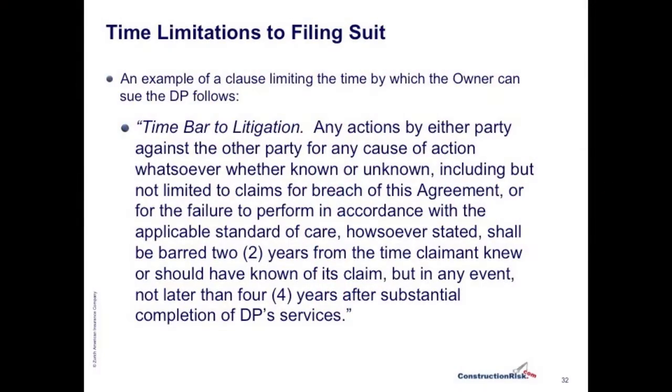I also use a clause that reads like the following. Quote, "Any actions by either party against the other party for any cause of action whatsoever, whether known or unknown, including but not limited to claims for breach of this agreement or for failure to perform in accordance with the applicable standard of care, howsoever stated, shall be barred 2 years from the time claimant knew or should have known of its claim, but in any event not later than 4 years after substantial completion of the design professional's services." Close quote.